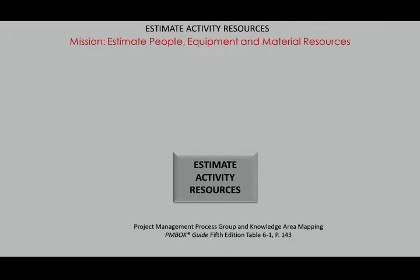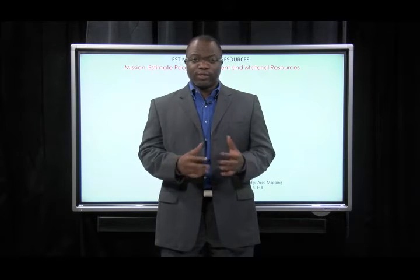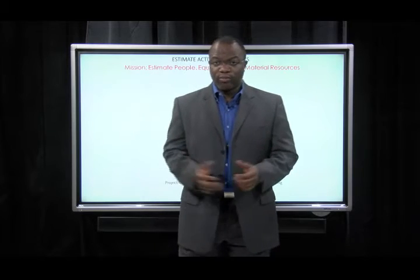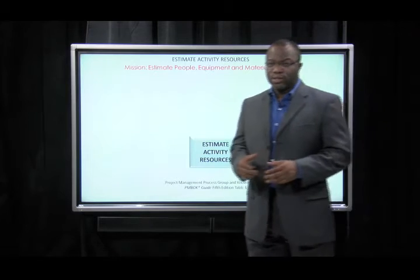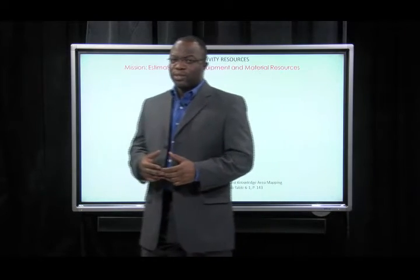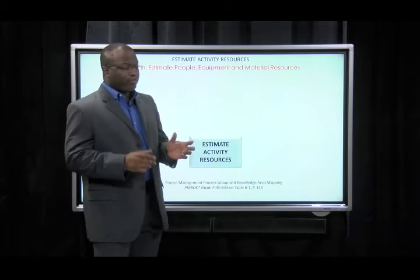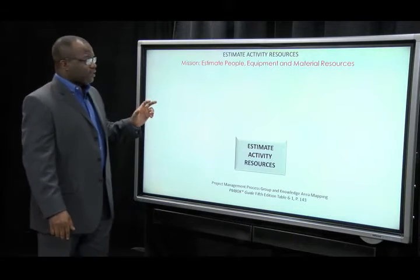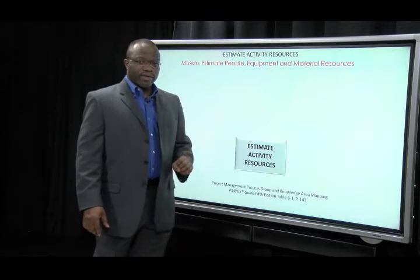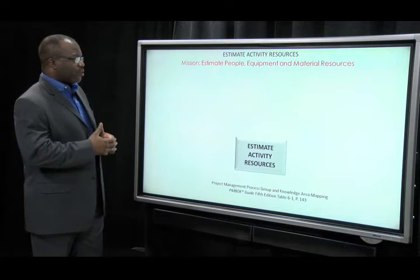Estimate activity resources. As the word resources implies, this is an all-inclusive consideration of any type of resource, be it human resources, equipment resources, and material resources that are needed to complete the project work. This is an exclusive process in that there's no other process in the PMBOK Guide where equipment and material resources are considered. So this is a very important one.